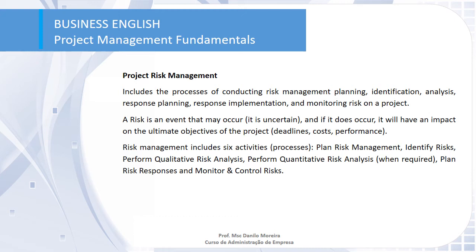So risk management includes different activities. They are plan risk management, identify risks, perform qualitative risk analysis, perform quantitative risk analysis, risk responses, and the last one is monitor and control risks. With this map, you are going to have a very good map on how to attack if something not good happens to your project.